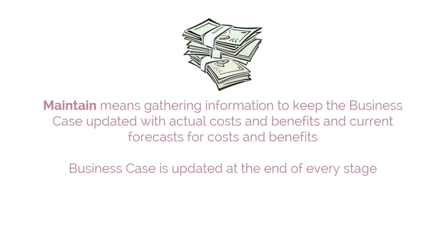Let's look at the next step, maintain. Maintain means gathering information to keep the business case updated with actual costs and benefits, and forecasts for these costs and benefits. The business case is updated at the end of every stage using the managing a stage boundary process.